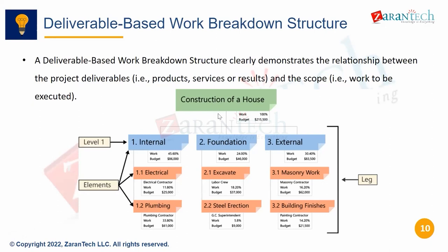The WBS structure is still a must-have, because the activities will get linked to it. Because we have the budget, you see here, budget figures. These budget figures are given at WBS element level, not at activity level. Okay, so we'll come to that. I'll take that example and we will see how it is done when we learn activities and then go into the system. That time we'll take that up. Okay.